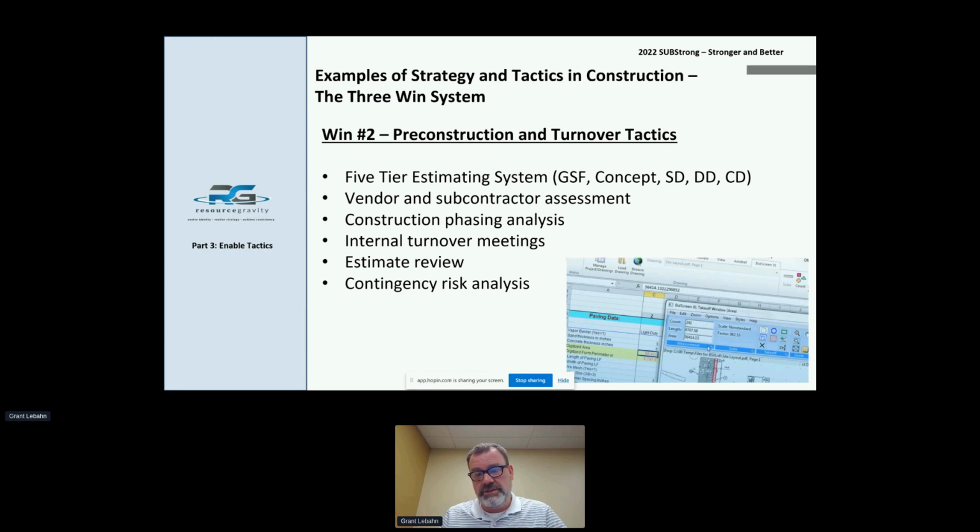And then you get into the last 3 phases: schematic design, design development, and construction documents. For this type of program, you would say, all right, what is my level going to be? A lot of times this lumps into one thing. So maybe a 5-tier estimating system turns into a 3-tier or 2-tier, or whatever your company needs are. But it would say, anything after that, if I have drawings, I'm going to use my hard bid estimating. I'm going to bid this job and give you a bid number, because that's my tactical response I'm going to use for a job.